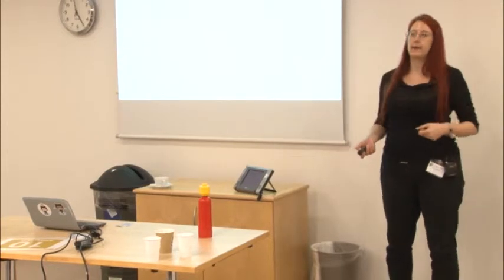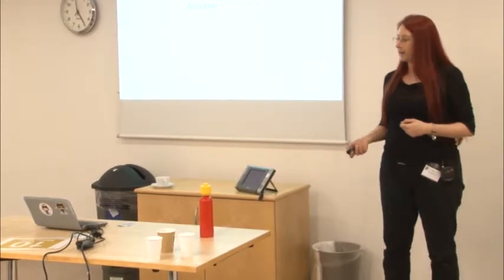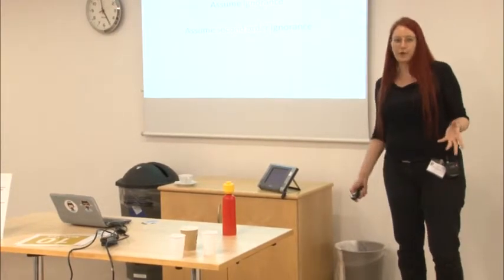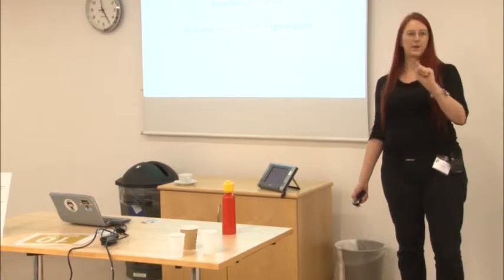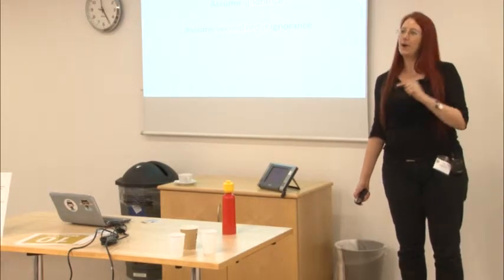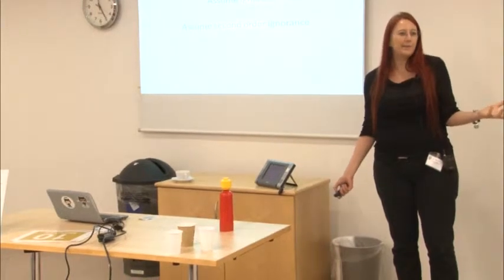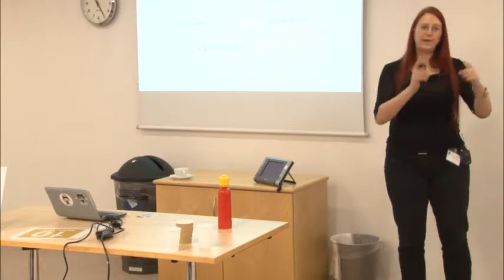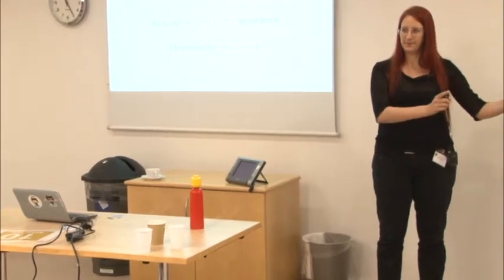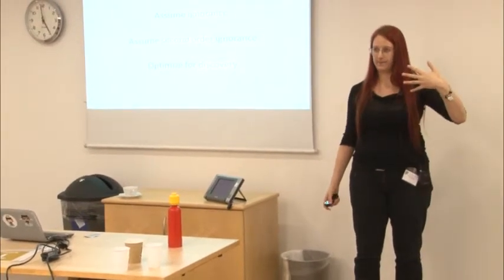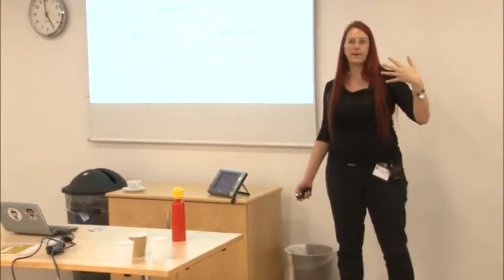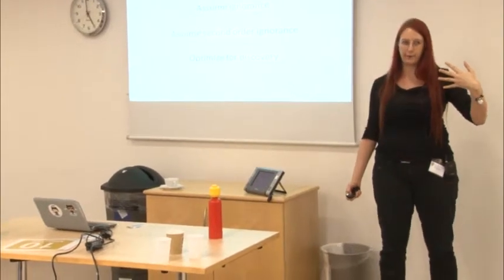And Dan North came up with this thing called deliberate discovery. He says, assume ignorance, right? You don't know everything about a project because some of it's new. Assume second order ignorance. There is stuff you don't know. But guess what? It's going to be associated with the new stuff you've never done before. Optimize for discovery. That means do the new stuff first. Those 5s and 4s, hit them early on in your planning, right? Do them first, because that's where most of the discoveries are going to be. That's going to tell you whether the project is a go or not.